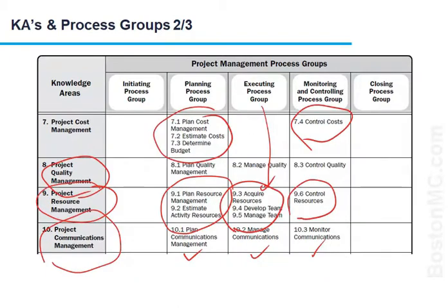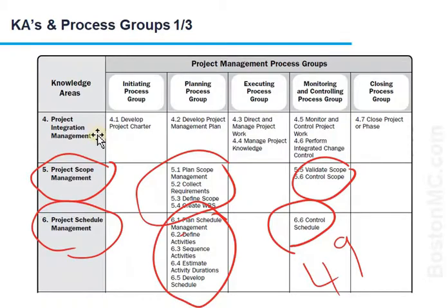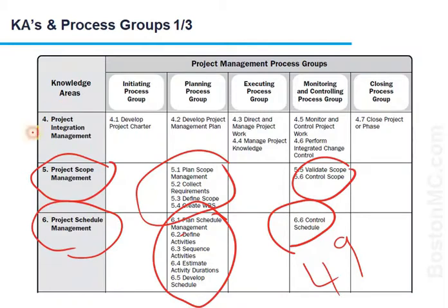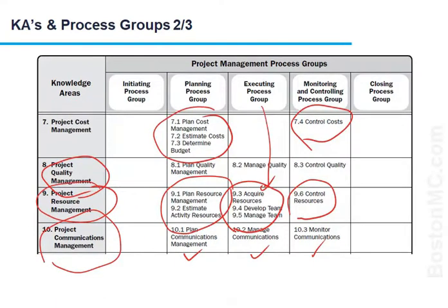I mentioned that the last one I was going to talk about was integration management. The reason I left this for last is that integration management is a little bit different from the other ones. It represents, in a way, the framework of the project. If you look at it, it has an initiation activity, which is the project mandate or project charter. Then this is the planning. This is where you do all of your planning for your project. So it says develop project management plan. This is one huge plan that includes all the plans that you see on the next few slides.